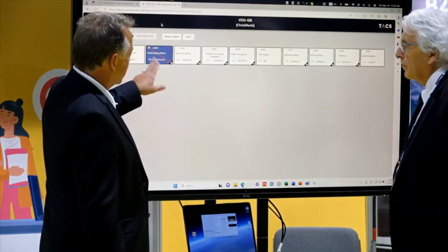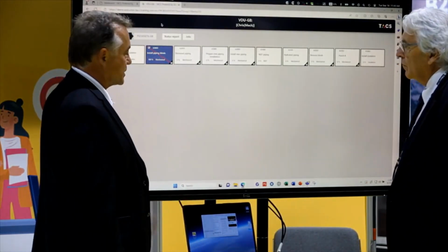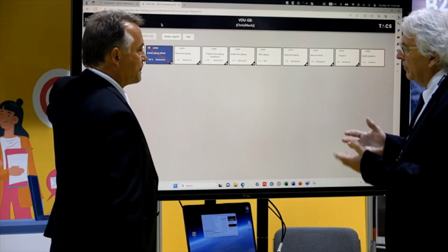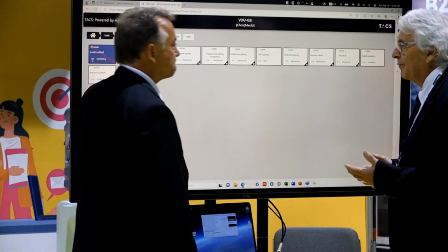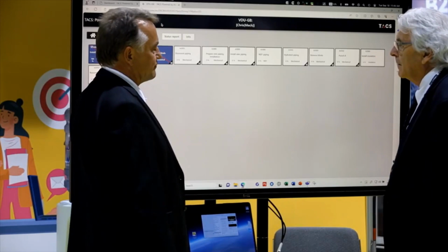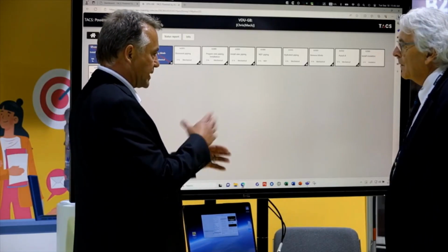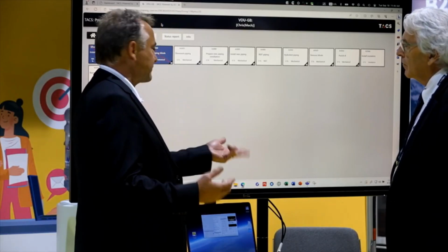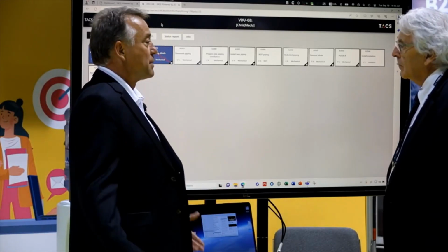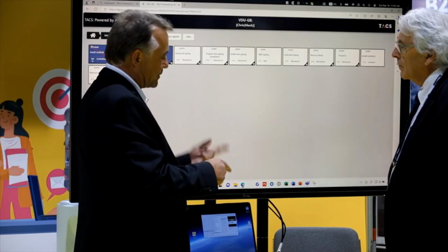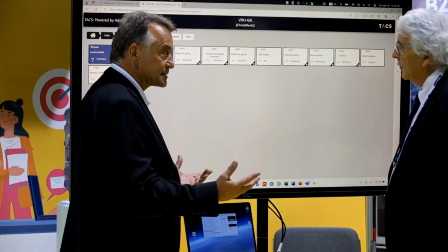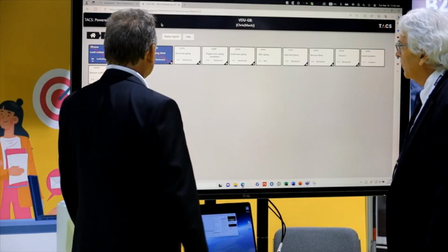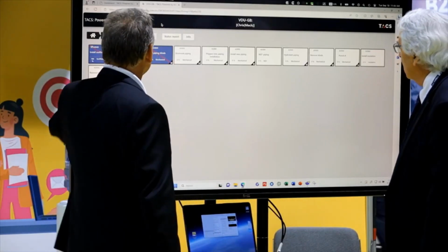It doesn't get rid of it. It just cancels it, so you know that it's been canceled. Not required. That builds your database for the next time through. Perhaps as job packages get built independently, sometimes because they're independent, they'll say scaffold required, scaffold required, scaffold required. But there are 3 job packages that happen to need one scaffold, and maybe that didn't get caught in the optimization process, right? So you can remove that.